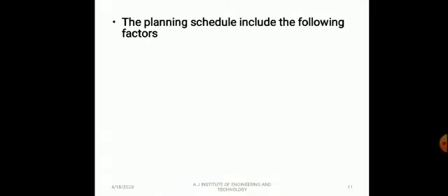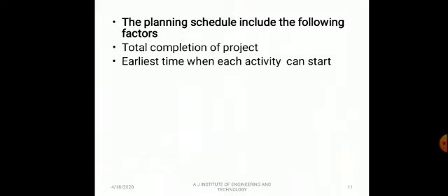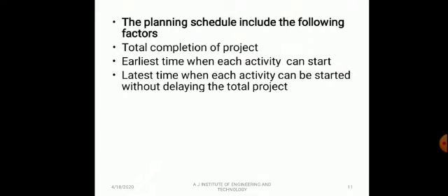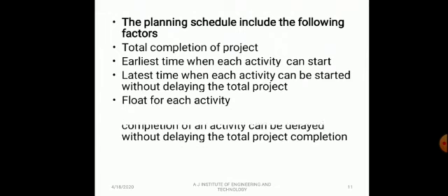The planning schedule includes the following factors: total completion of the project, earliest time when each activity can start, latest time when each activity can be started without delaying the total project, and float for each activity.